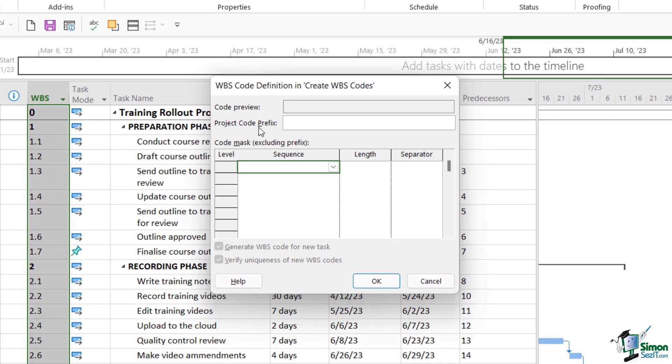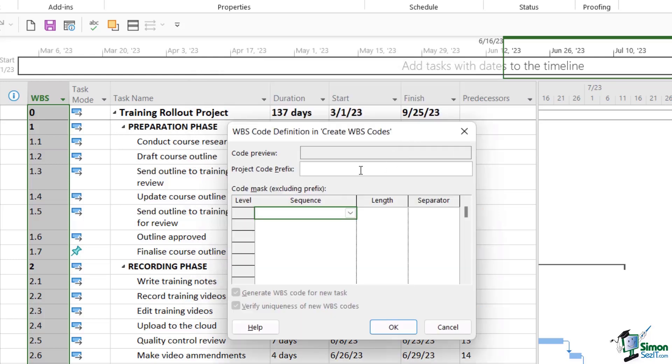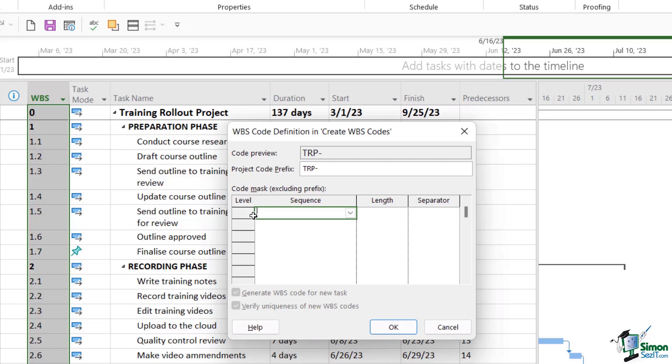Now the first thing we can do here is we can add in a project code prefix. So in order to uniquely identify this project, I could give it a prefix of let's say TRP for training rollout project, and I'm going to put a dash there because I want a dash to separate that project code prefix and any numbering that I go with after this.